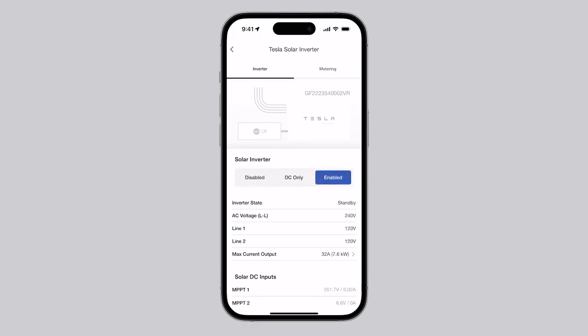select the solar inverter and select Enable. This will initiate a series of automatic self-tests. When self-tests are complete, the inverter state will switch to Active.